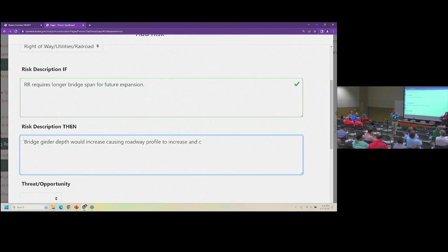So the way that risk would carry forward today, from feasibility design, this project didn't have one, which is why we don't have preliminary plans for you. But if you have a feasibility design, there's a section in that project scoping report, as Andrew mentioned, that's related to risk. That's going to be in the project manager's bag of tricks when they first get the project, and they use that to start populating the initial risks for new projects that have had feasibility studies. Let me just say that, because that process didn't get introduced until we started our IPD or PDN process. So if you have a project now that's coming in and the feasibility study was done years and years ago, the scoping report wouldn't have it.